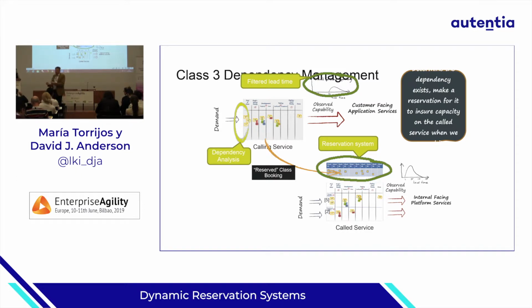This is a campaign coming from, let's pick a customer, Iberian Airlines. And there's a 50% probability that when Iberia asks us for an ad campaign, we actually need to do custom photography. So with a 50% probability, we need a reservation for the photographer.